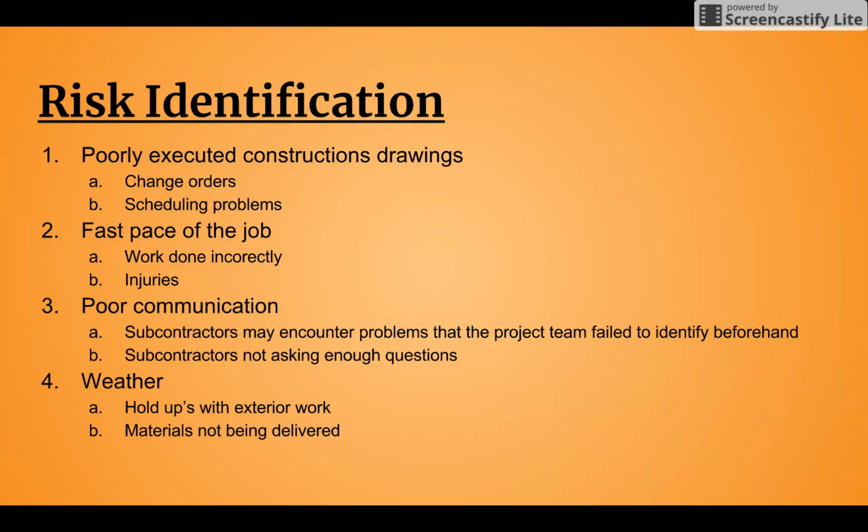But also on the roof, there are two AC units that need to be installed, and a crane will be required to place them there. If we schedule the crane to come one day, which is not a cheap thing to do, cranes aren't cheap, weather could throw things off with the schedule and the budget. So we hope that does not occur.